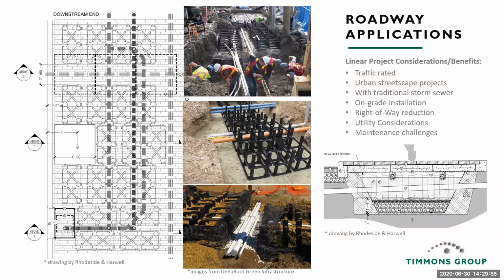I highly recommend in some of those urban settings getting lots of test pits, test holes, on the utility information that you have, to discover whether or not those utilities are encased in concrete, which can quite often be the case. And Silva Cells obviously would not play well with any concrete in the ground.